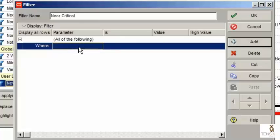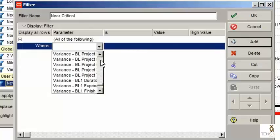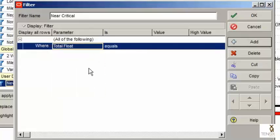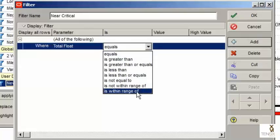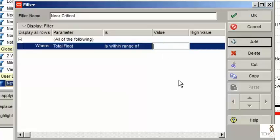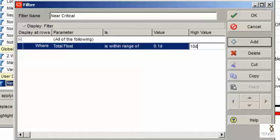The parameter for this filter is total float. The equivalency is within the range of. The low value is 0.1d — put in a lower case 'd' because the upper case 'D' will not work. Type in the high value 10d, lower case, and that is it. That is our near critical filter and it is on.